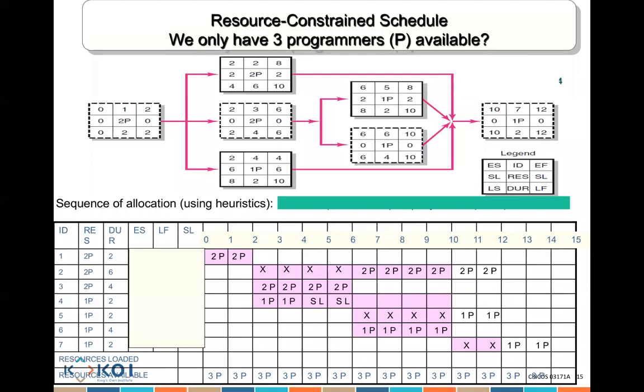So in normal conditions, if you have enough resources, your project will finish in day 12. In the circumstances where you don't have enough people, what is happening? You're basically using all your slack and pushing the project beyond its original deadline because you do not have enough resources. You have a constrained resource available. If you add more resources, all of this becomes correct. It will finish in day 12. If you have no resources, which means you cannot add more, the time of the project needs to be increased. Does that make sense? Yep, got it, sir.